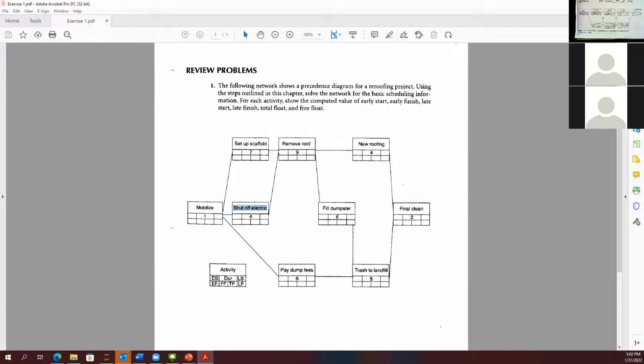If you have 30 days, you build up your critical path. The summation of the critical path duration should be 30 as well. That's the length of the summation of all the critical activities. It shouldn't be 16, it should be 30 days. Okay, that's a critical path.